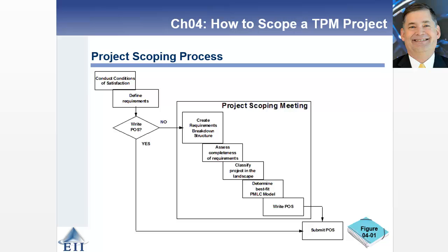How about the entire chapter on one slide? So ideally you want to start out with writing conditions of satisfaction and sitting down with the customer to work through those. Conditions of satisfaction work well for small projects and then medium projects. It's not going to work well with larger projects because there's simply too many requirements that have to be assessed.